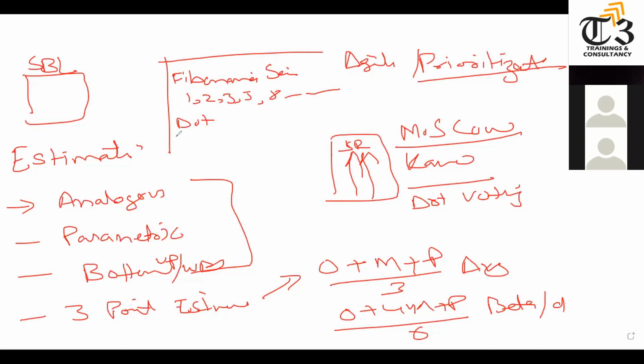We can use the collaboration games or planning poker, where we can have our t-shirt sizing, like small, medium, large, and XL, and so on. So we can estimate the user stories. Once we choose small, we have to define small is equal to 1 hour, and medium is equal to 5 hours, and large is equal to 2 days, and so on. So this is prioritization and estimation.